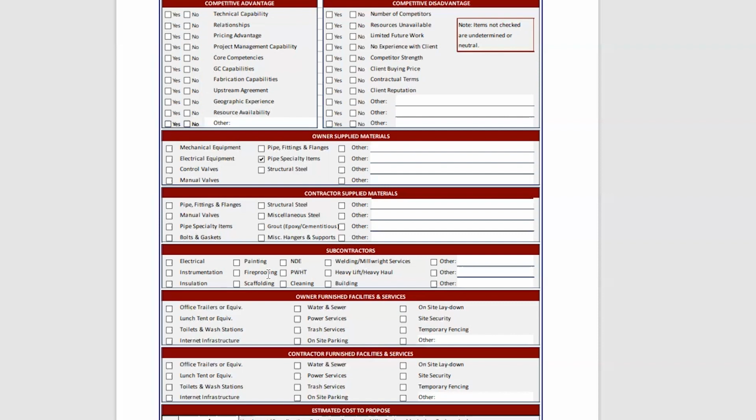Right, because when we were bidding it, we would factor out, okay, we need at least one journeyman on the job. How many apprentices can we get on the job? So with that, we would be able to adjust our wage and labor costs that way. But once we went into execution, if we could get by with just 2 people on the job site, we would, depending on what phase of the execution we were in.